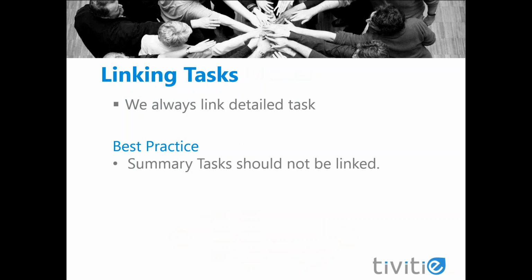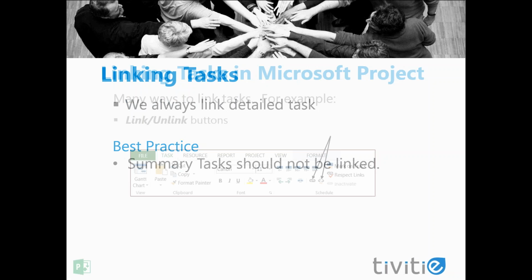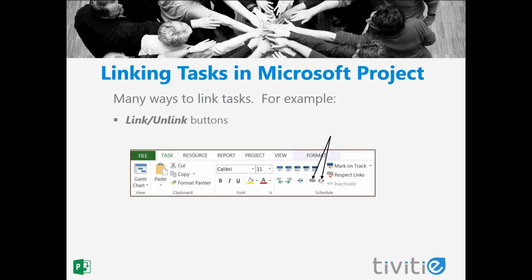We always link detailed tasks. So what we'll see in just a moment is we're going to be linking down at the lowest level of detail. Summary tasks should not be linked. There are lots of different ways to link tasks in Project.